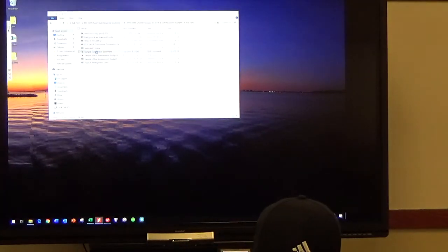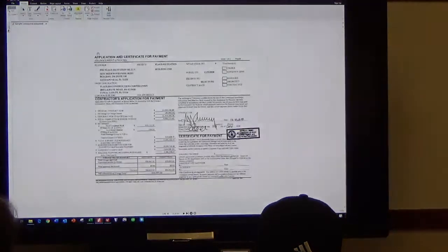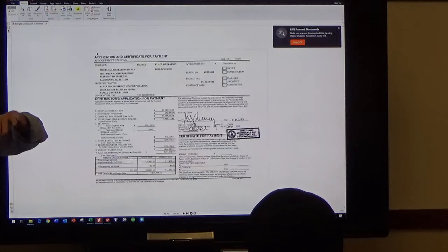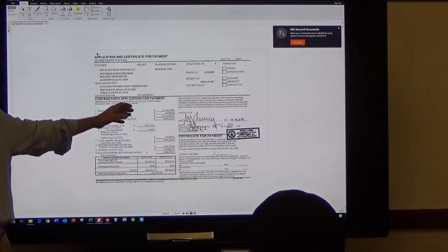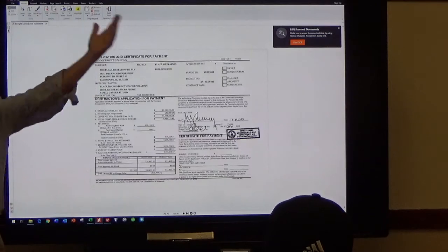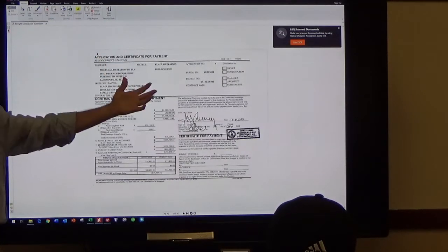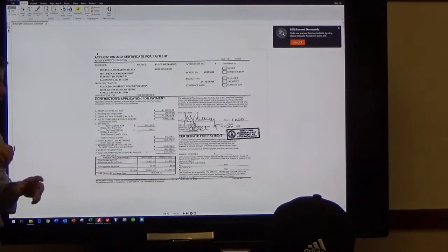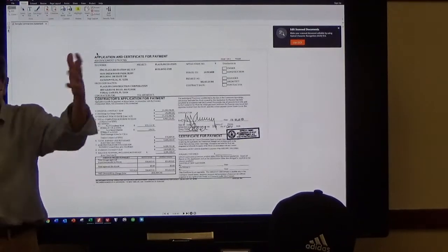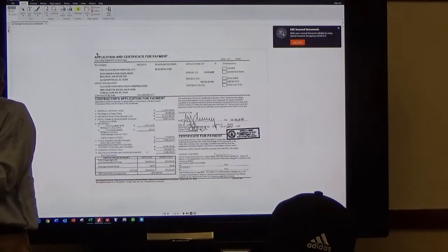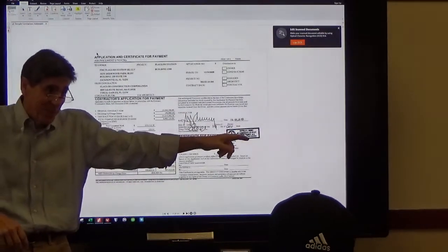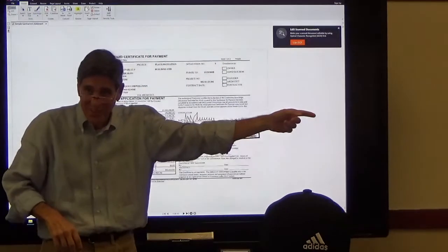And this is a real invoice. GCs tend to, if you ask them to, bill you on a standard AIA form, the G702. The backup is on another AIA form, G703. Typically it's a paper monster. They're getting all the subs' invoices in, adding their fee to it, putting a package together and sending it to you on the 15th, so you can process it.